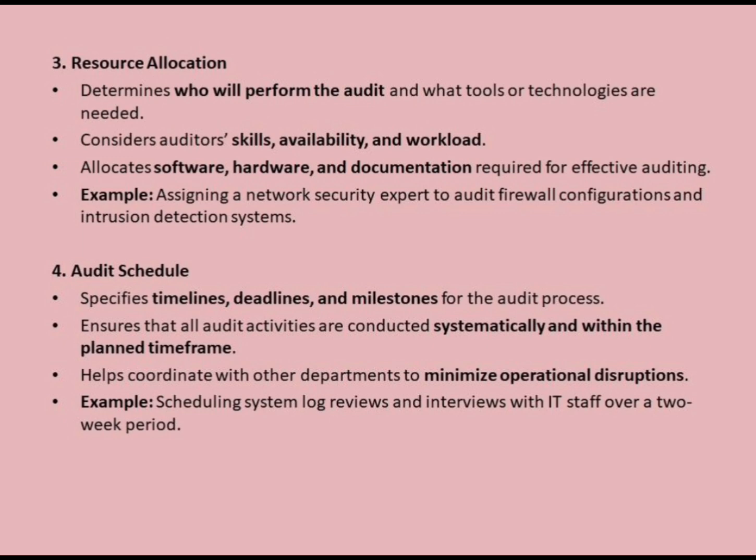For instance, a network security specialist may be assigned to review firewall configurations, intrusion detection systems, and VPN settings, while an application security expert might focus on web applications and databases. Resource allocation also includes providing the necessary software, hardware, and documentation required for auditing, such as log analysis tools, forensic software, and access to system manuals. Proper allocation guarantees that the audit team can perform their tasks efficiently and thoroughly without delays.